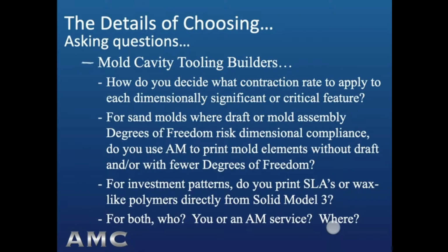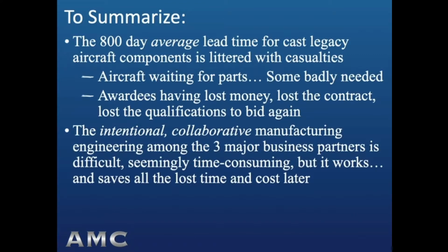To summarize, the 800-day average lead time for cast legacy aircraft components is littered with casualties. For example, aircraft waiting for parts, some badly needed. Awardees having lost money on contracts, or lost the contract, or lost the qualifications to bid or win bids again. Intentional collaborative manufacturing engineering among the 3 major business partners is difficult, seemingly time-consuming, but it works and saves all the lost time and cost later.